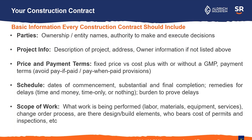Finally, you want to have the scope of work outlined in your contract. It's important not only to have the scope, but to also understand the different terms and conditions that might apply. You could have a very clearly defined scope — particularly in a subcontract for a large commercial project — say, we're just doing drywall work. But then if you look in the terms and conditions, maybe there's some design assist rule that the subcontractor wasn't expecting to do, and suddenly they're roped into hiring an engineer to help design how their work attaches to the project. That's not something they had planned on in their bid. So you definitely want to know all of the elements that are in the contract.